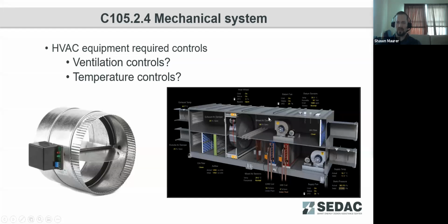Again, really just going back to, does what's installed at the site match what was originally designed for the building? And if there was a significant change, was that change documented and then re-verified to be in compliance with the codes?